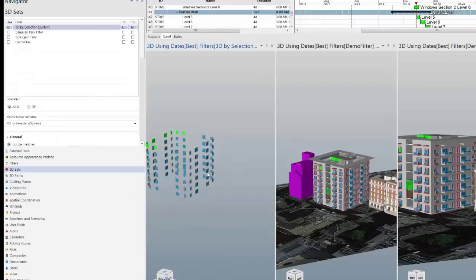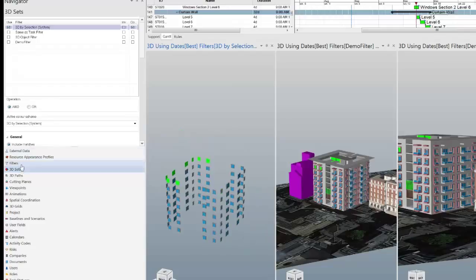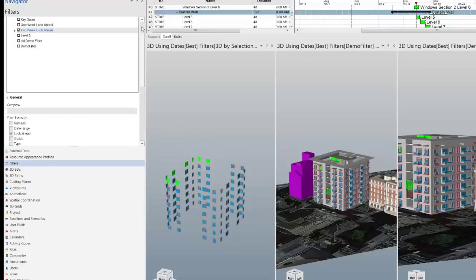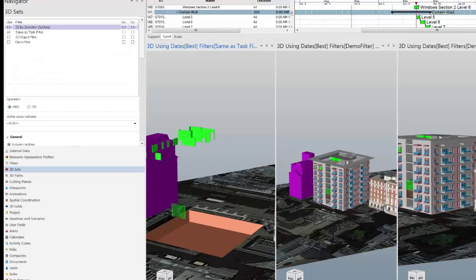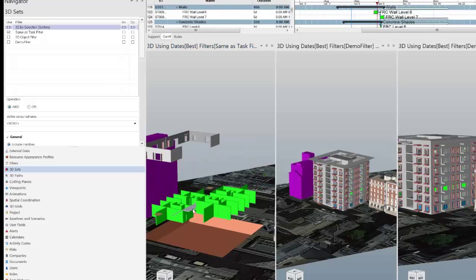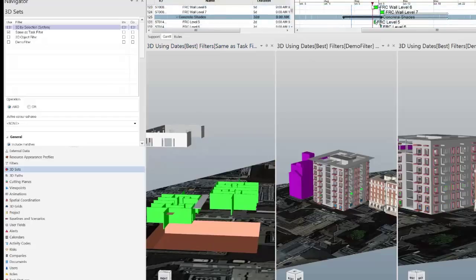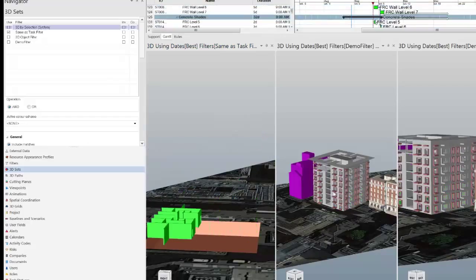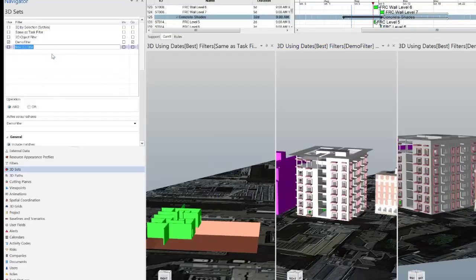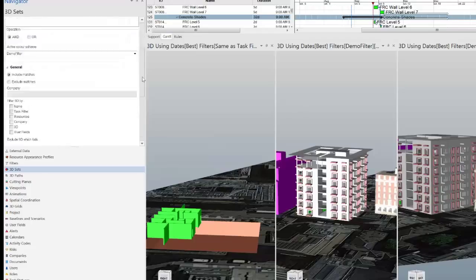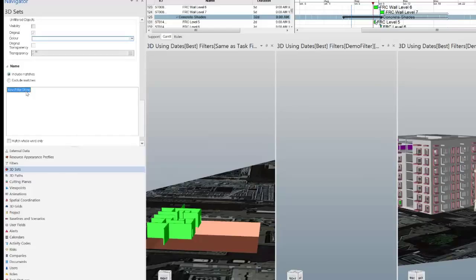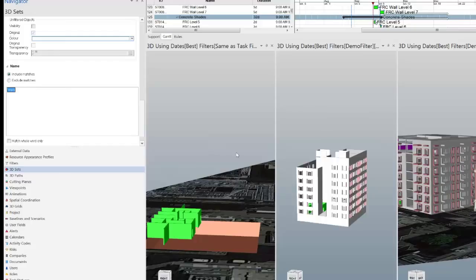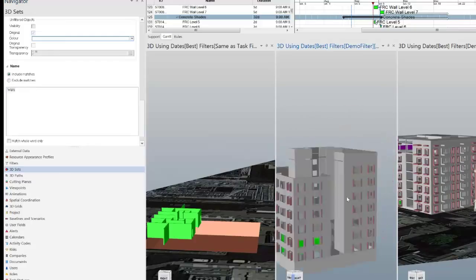In the third view I'm going to add a specific filter by creating a 3D set filtered by the selection system. I've got the filter set to two-week look-ahead, so if the 3D set is set to 'same as task filter,' this view will be filtered based on the current focus time — the 3D objects shown are what's currently being built. I'll also add another 3D set called 'Walls,' adding the filter string 'walls,' so that view only shows the walls.